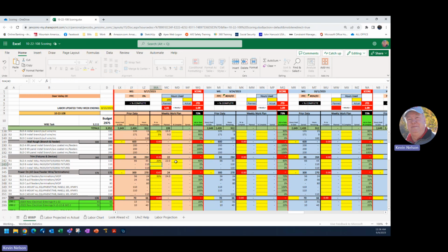So right now you can see that my work plan, I'm about 199 planned, and my hours worked are 200. That's very close. So maybe I could get a little bit more of this done and we could increase that percentage to 25%. That would give me 204 hours potentially earned, and I'm working 200 hours. So hours earned divided by hours worked gives me a par score of 0.98.